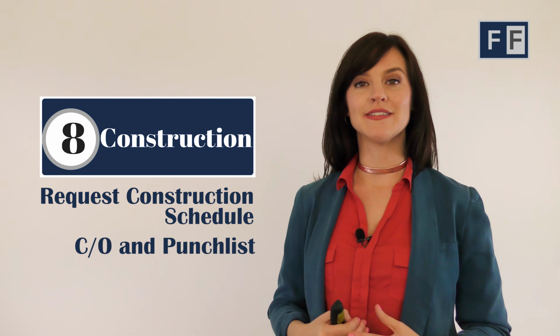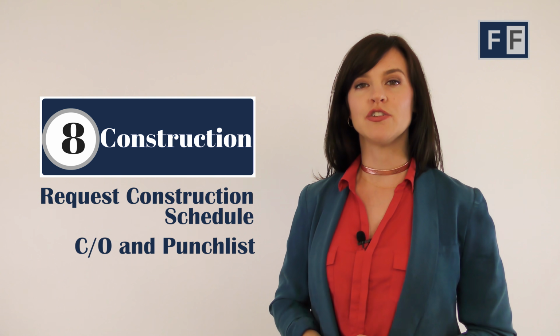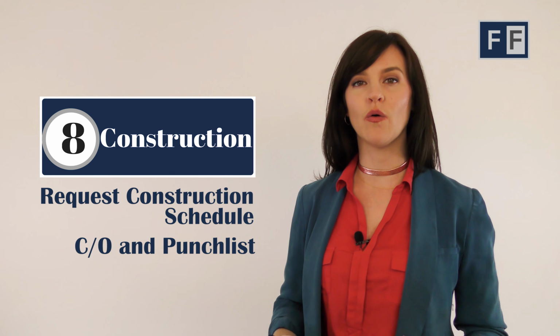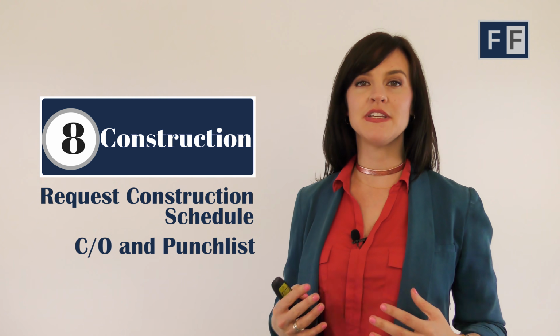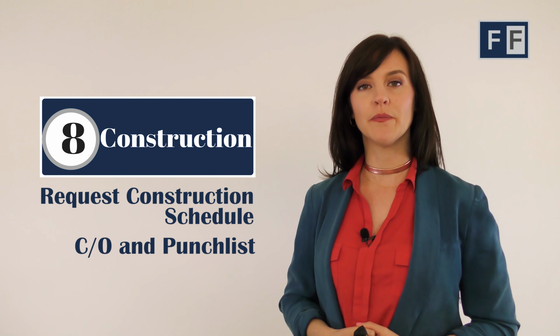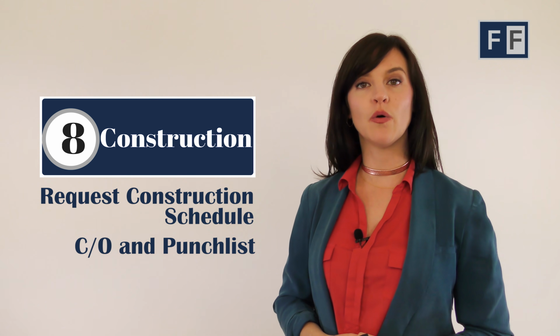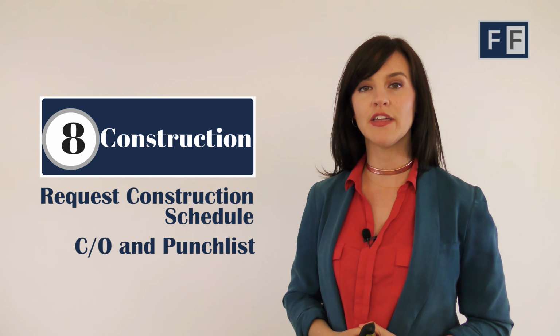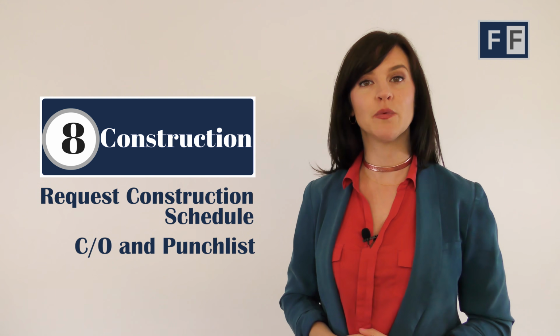A TCO is a temporary certificate of occupancy and may allow you to start your training or initial inventory unloading, but please keep in mind with the TCO, you are still responsible for obtaining the permanent CO. Now, at this time, you're also doing a punch list. So the contractor is going to do a walkthrough with you and make sure that everything is done per your lease agreement and per your contract with them.